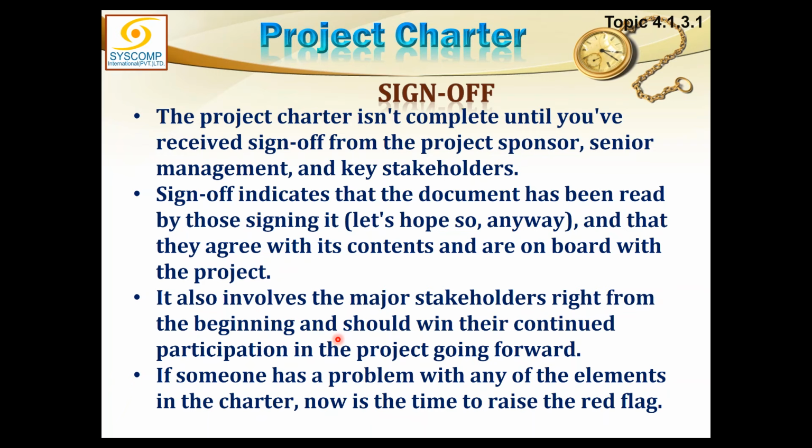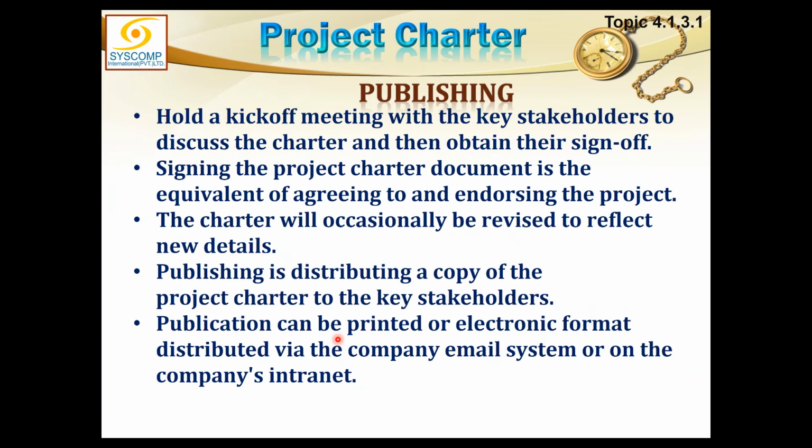If someone has a problem with any of the elements in the charter, now is the time to raise the flag. So I have brought along all the important stakeholders, and if there is a problem by anyone, this is the time he should speak against it, or he should keep mum forever. Now this charter has to be properly celebrated, with a kick-off meeting with the key stakeholders to discuss the charter and then obtain their sign-off. Signing the project charter document is the equivalent of agreeing to and endorsing the project. All those who have signed the charter have actually endorsed the project.